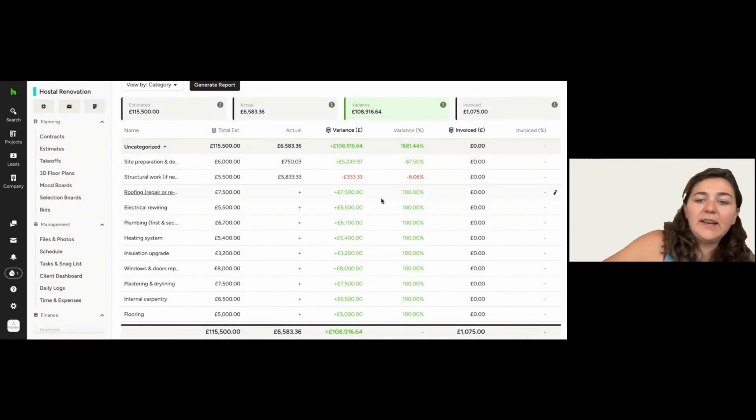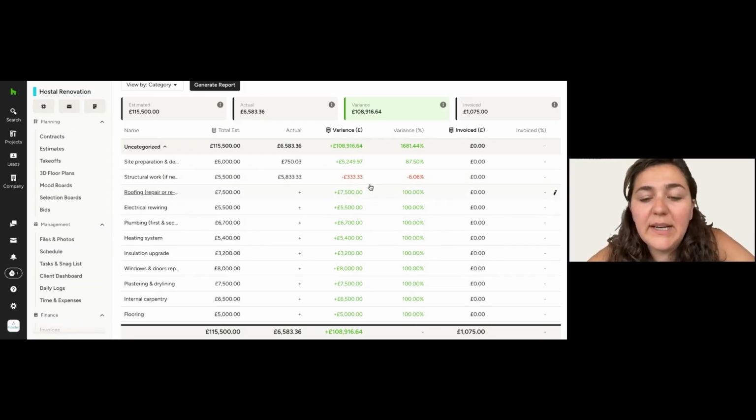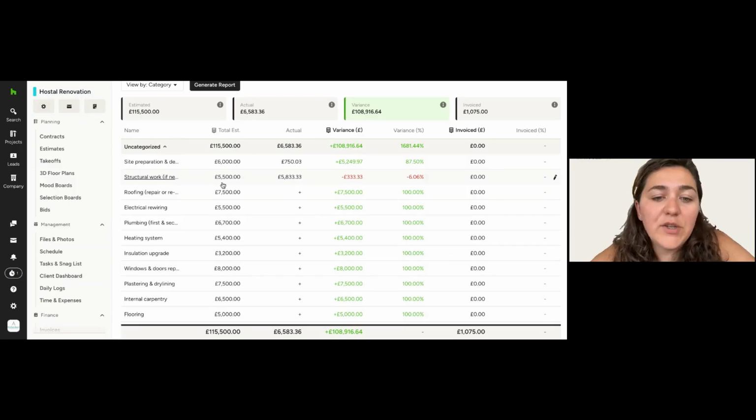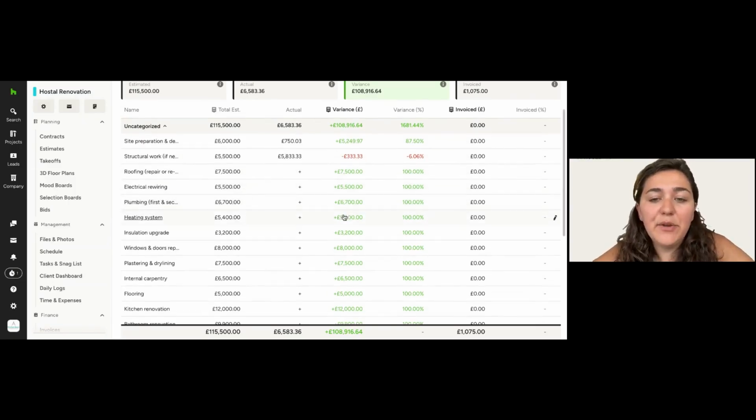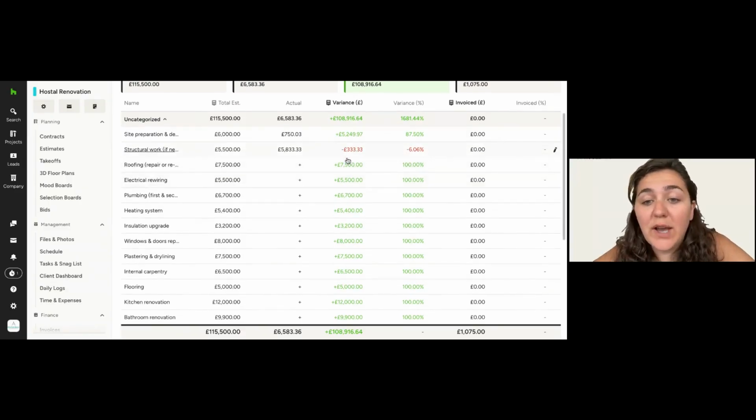Then in here, I can see what I've done, right? And so basically what's happening here is that I'm in negative. So I spent more than I actually estimated. So it means that for you, it's a red flag of saying, okay, well, right now I'm actually eating my margin. So I need to find a solution to actually make it positive. So do I make it positive under other type of project?